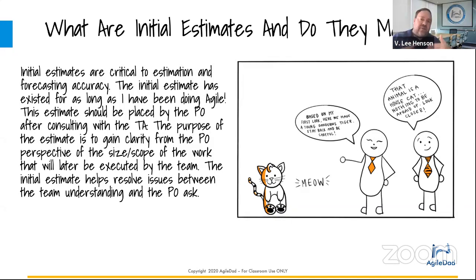Then what you'll see is over the course of 2 or 3 sprints their velocity slowly increases. But then you'll see it kind of table out. You'll see a plateau, and that's when you have your head around what the velocity is. But you often want to do an extra sprint or two just to make sure you've got it. So there's a lot of opportunity there to make sure that you're in the right place and that you understand. Then you can use that to forecast future sprints, at least for that quarter. And next quarter, you just revisit to make sure you have the same benchmark. That'll keep the team's velocity consistent.